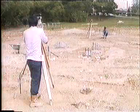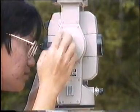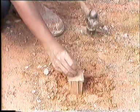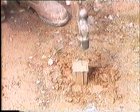The first task to be done is the surveying and setting out of the site. This includes checking the location of the bored piles, which, because of our tight schedule, were already installed before the training program began.